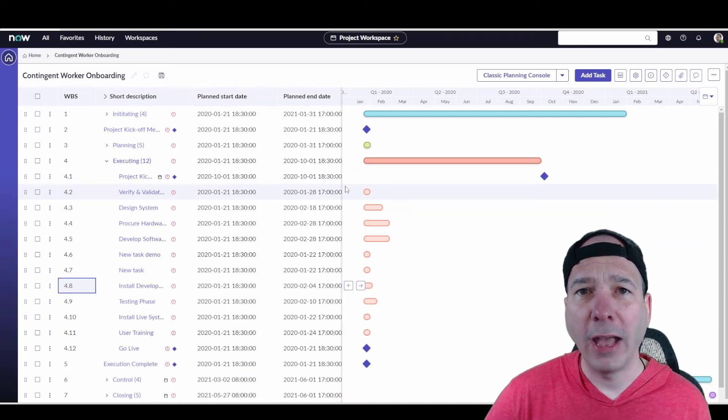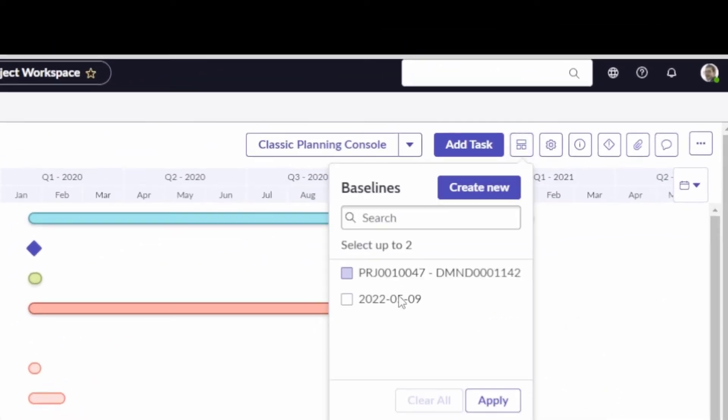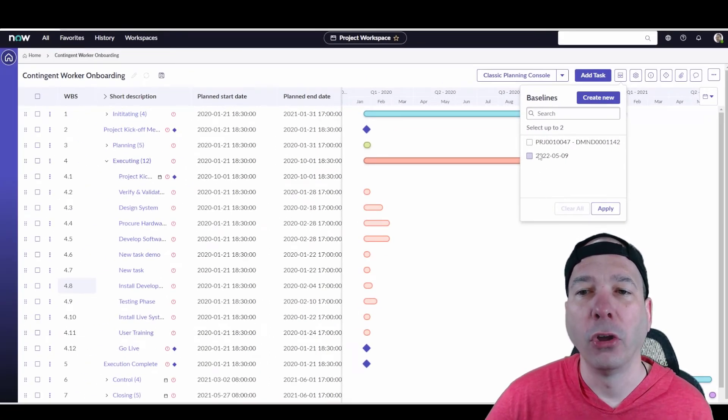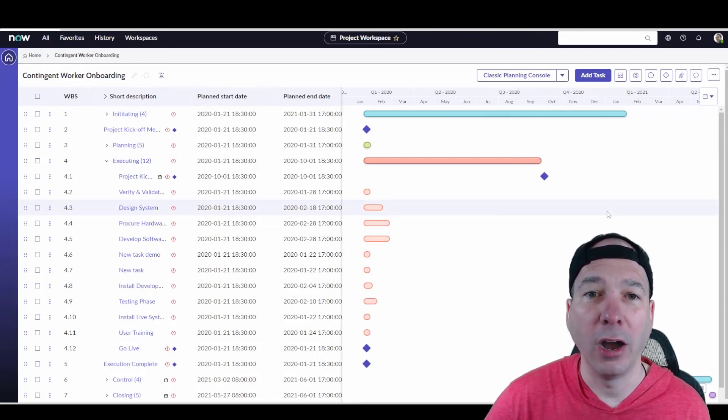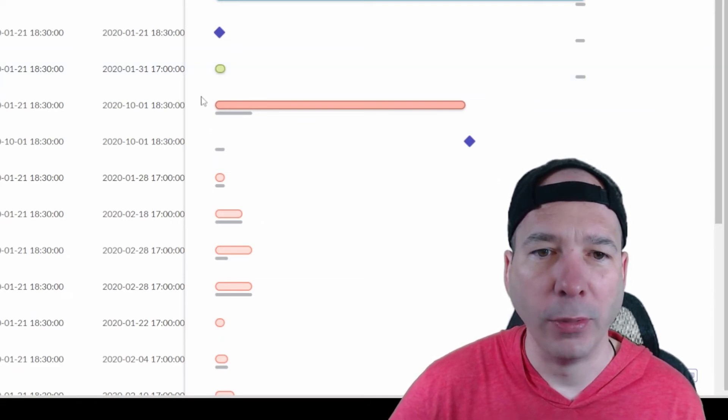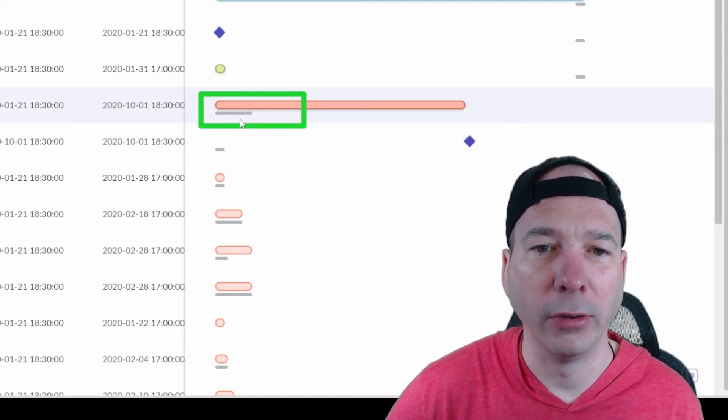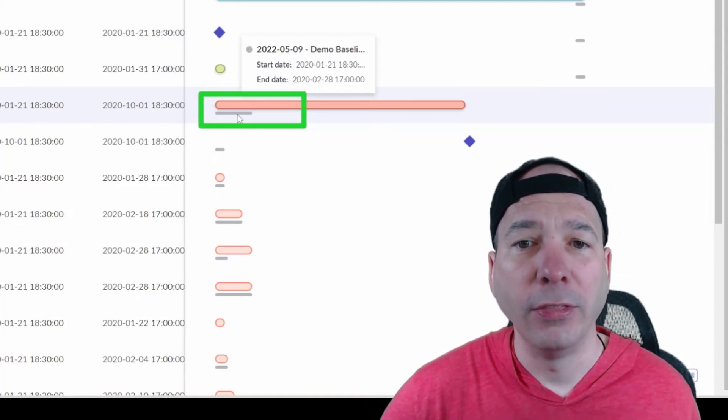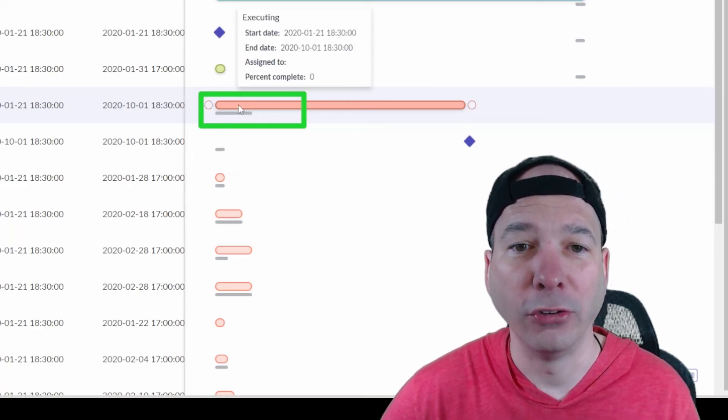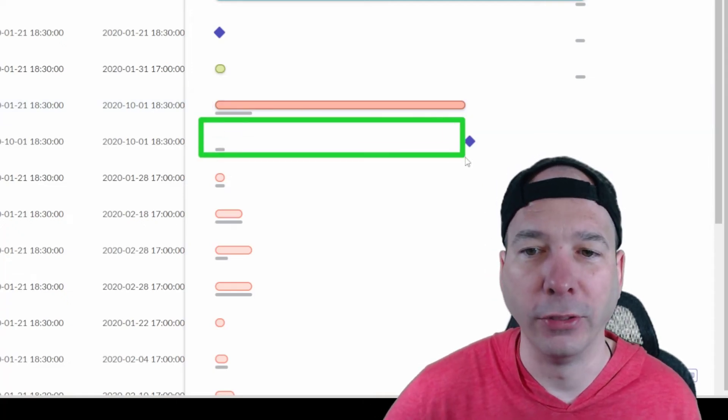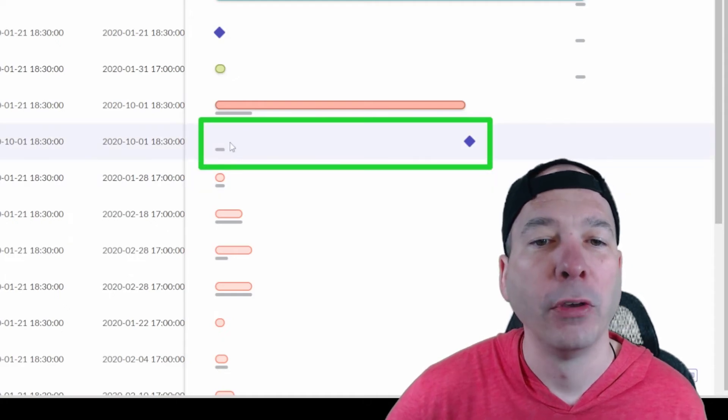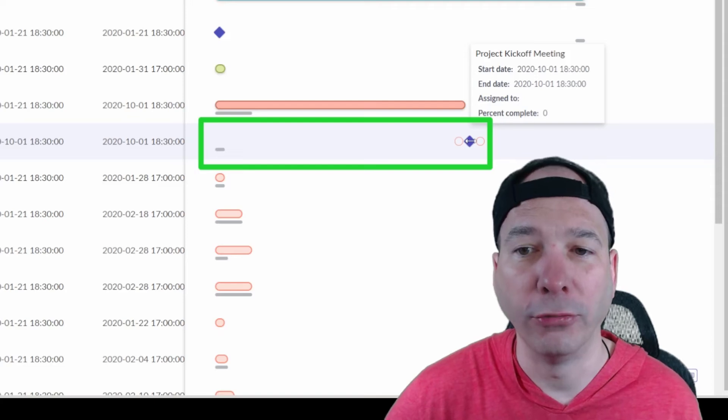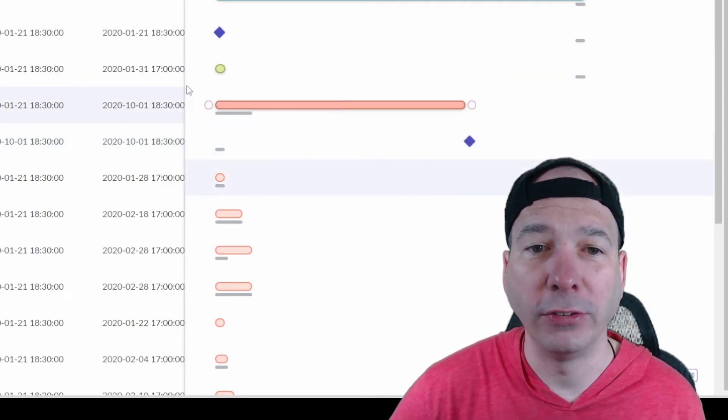Next new feature has to do with baselining. So, this was interesting. You may have baselines on your project. You can establish those. And, when you move something, whether that's scheduling or even financial stuff, ServiceNow is keeping track of what that value was and what the new value is. So, we can now track what that looks like on the project workspace. So, I'll call your attention to these little pictures here, right? So, you've got a gray bar indicating this is where the baseline was, and then this is where it actually is. So, it used to be the end date was 2-28-2020, but now the end date is 10-1-2020. I don't know if you can tell. What happened here is this guy, this project kickoff meeting, got moved from, let's see, hover over here, January 21st all the way out to October 1st. And, I did that on purpose for the demo. But, that got moved. So, we can visually see that.